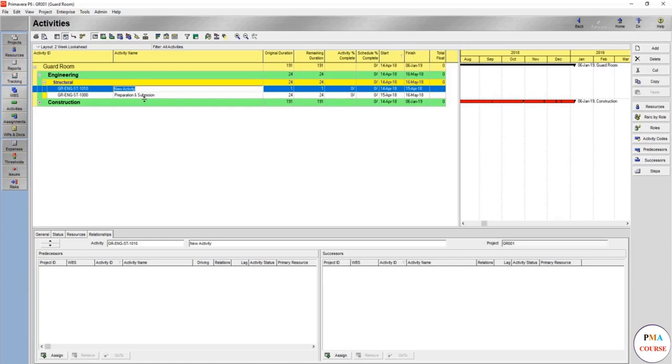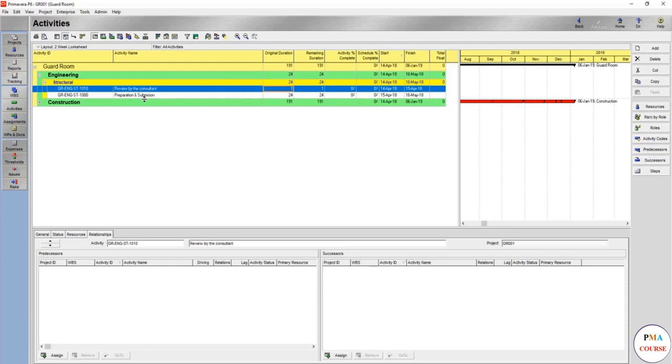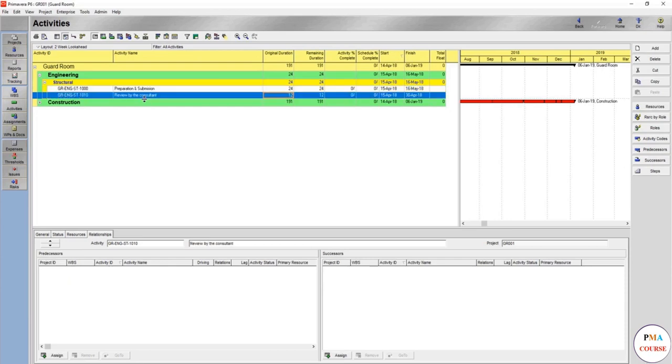And then we are going to give, after the preparation and submission, it would be review by the consultant. We would give the 12 working days, which is normally the maximum time as per the contract, which is 14 calendar days, but according to your contract as well.